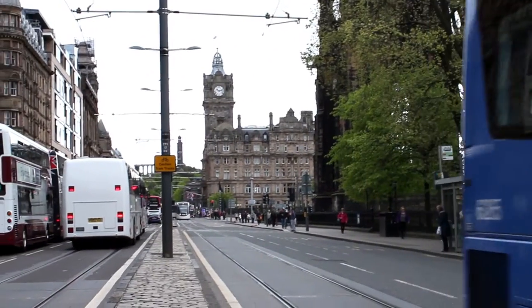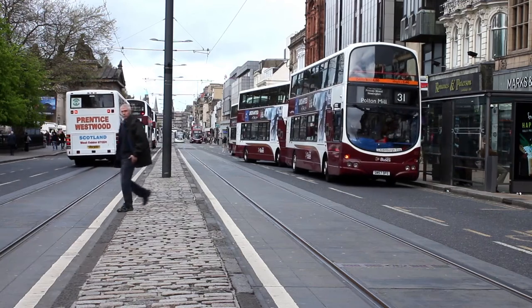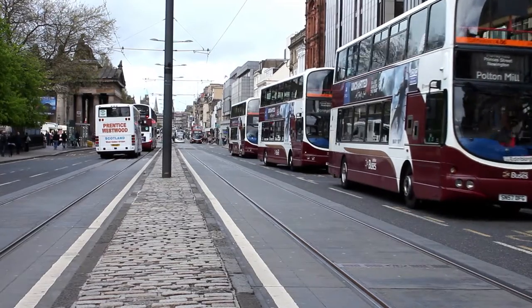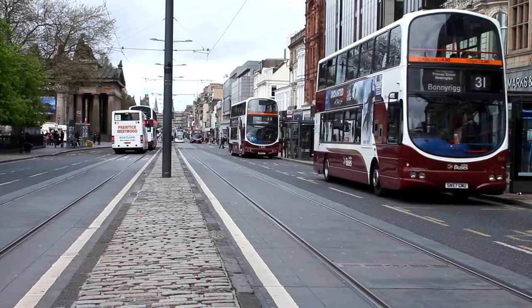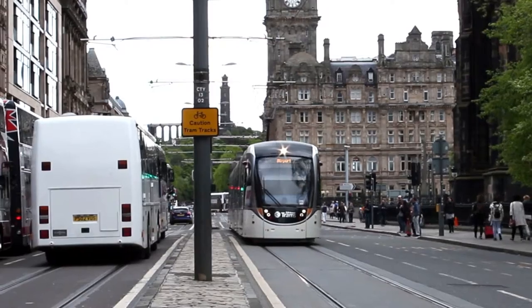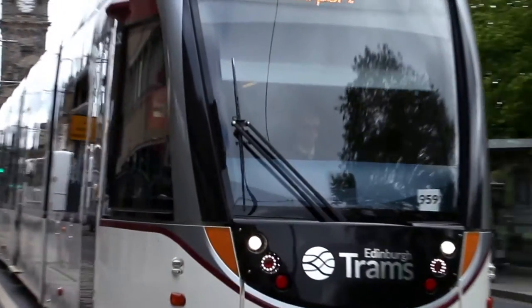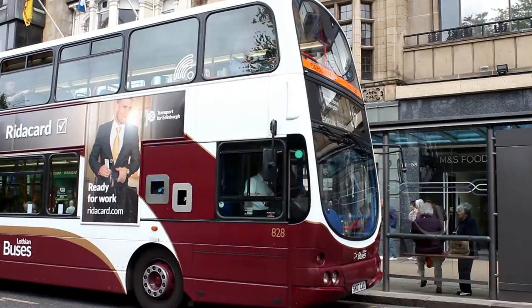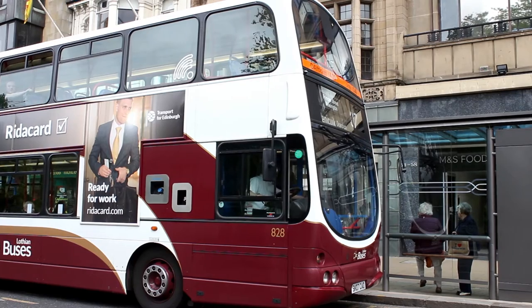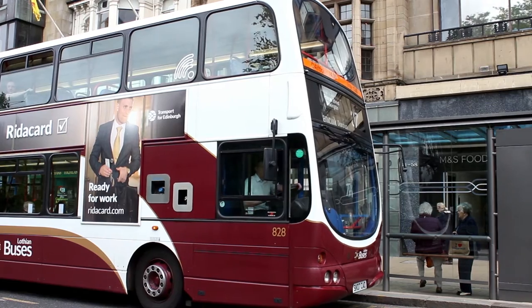After many delays with massive cost overruns, the Edinburgh Tram network opened in May 2014. The final cost was £776 million, over twice the original budget. In addition, the council has been landed with £200 million in interest on a 30-year loan to cover the funding shortfall.